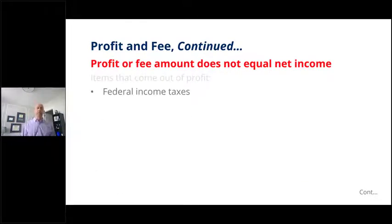Hopefully most of you accountants on this webinar know this, but again, I have to drive this home to the non-accounting people out there: federal income taxes, right? Come out of profit. We can't charge the government back for federal income taxes. Unallowable costs come out, right? Again, they're unallowable. They can't be included in the rates. So where do they come from? They come out of that profit and fee that you negotiate.